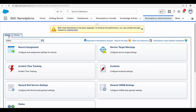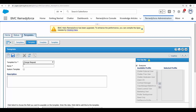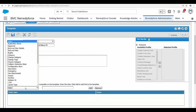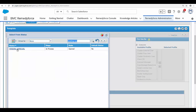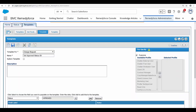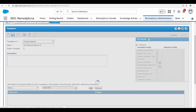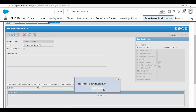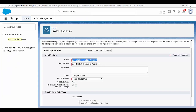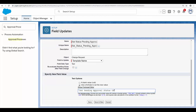Now that we are sure these statuses are available for change requests, let's go to Templates. I'm going to create three separate templates. Make sure 'Change Request' is selected in the 'Template For' field and give it a name. In the drop-down menu, search for the status field and select 'Pending Approval', click 'Add', and save it. Do the same for 'Approved' status and 'Rejected' status. Once we've created the three templates, go back to the approval process. In the first field update for the initial submission actions, select 'Template Name', then select 'Use a Formula to Set the New Value' and type the name of the template — make sure the template name is within double quotes.